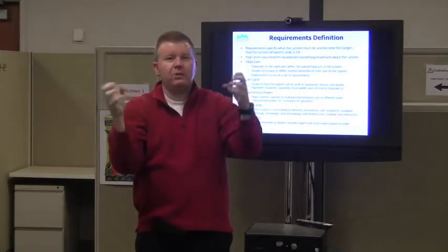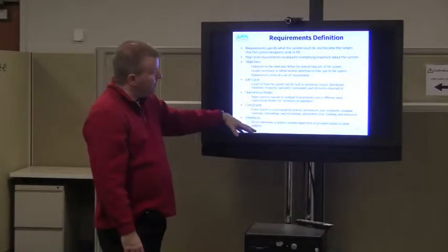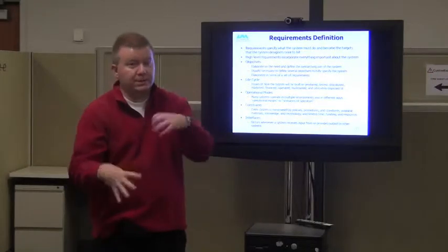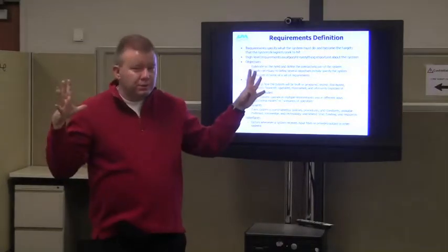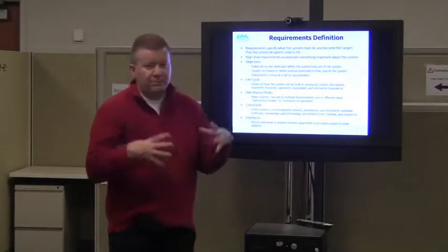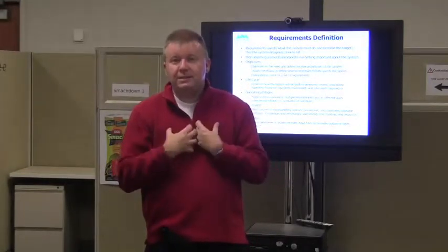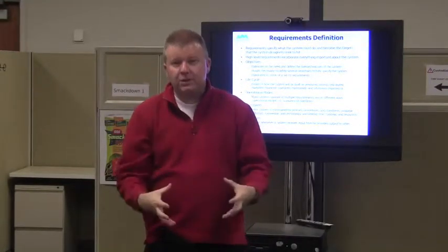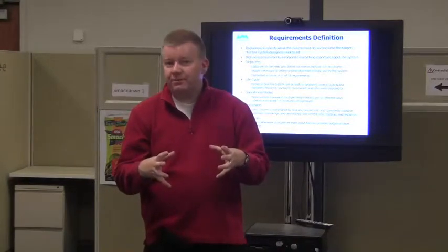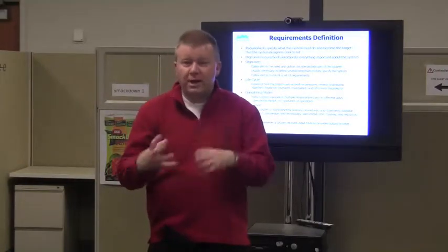And so right there is requirements, right? So it occurs whenever a system receives input from or provides output to another system, or subsystem or element. All of those are requirements as well. For instance, if you have a spacecraft that would have gone in the space shuttle, that's a system. It went inside the cargo bay of the shuttle, and it has to interface with the shuttle. So there's interface requirements there. All that has to happen as well.